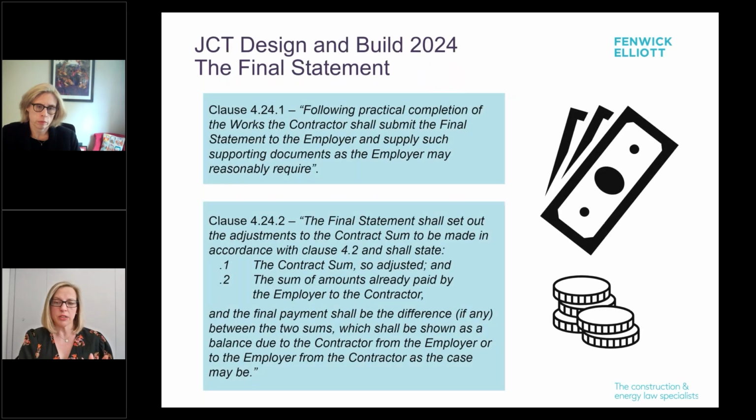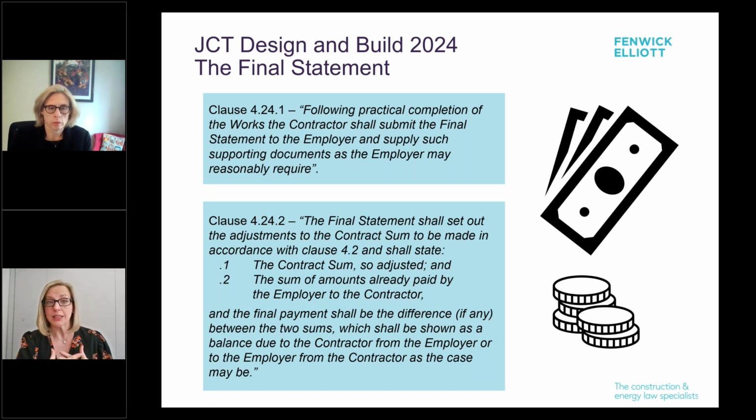Starting with the design and build form, clause 2.24.1 states that following practical completion of the works, the contractor shall submit the final statement to the employer and supply such supporting documents as the employer may reasonably require. So that's a fairly nebulous requirement, but I would suggest a good rule of thumb for contractors is that you should supply as many supporting documents as possible in order to support the final account position.